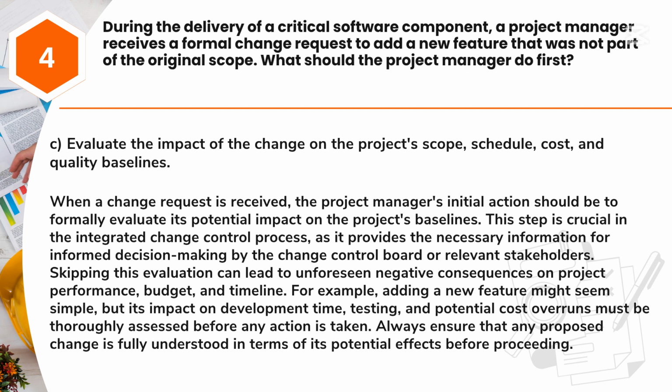Skipping this evaluation can lead to unforeseen negative consequences on project performance, budget, and timeline. For example, adding a new feature might seem simple, but its impact on development time, testing, and potential cost overruns must be thoroughly assessed before any action is taken. Always ensure that any proposed change is fully understood in terms of its potential effects before proceeding.